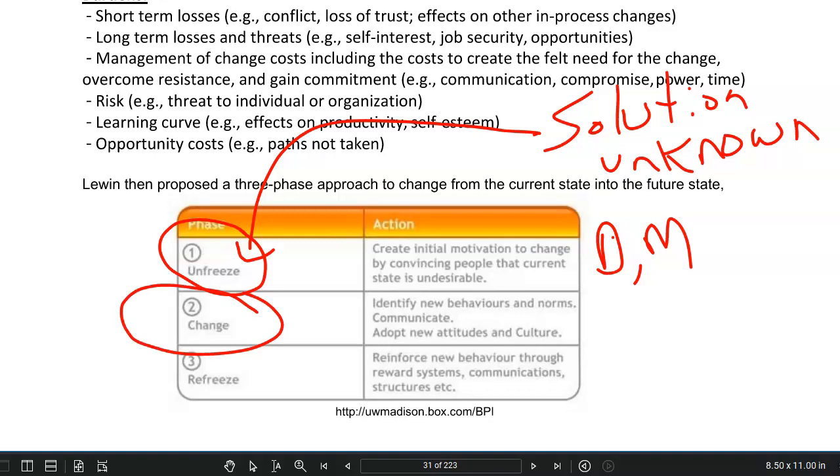Typically, this is done towards the end of the analyze phase when you have identified root causes. Definitely at the end of the improve phase when you know what the refined solution set is that's going to be implemented. So in define and measure, we're communicating that a change is going to happen. In analyze and improve, we're communicating it's no longer going to happen. It is happening, and here are the specifics behind it. Here's what our implementation looks like, and here's what the specific solutions are and how they attack specific root causes.